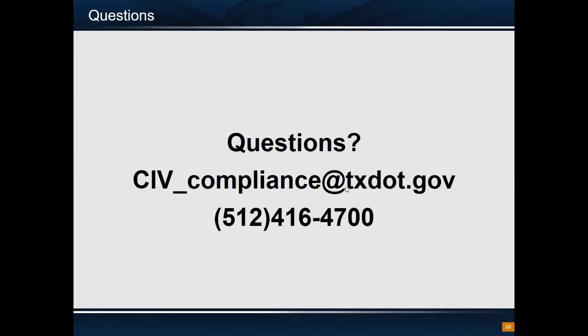Does the DBE goal apply to increased change orders or just the original base contract? The percentage assigned to the contract value will be the assigned goal — say, for instance, 5%. That 5% will never change. However, when a change order increases the value of the contract, that 5% will be applied to that additional value as well.